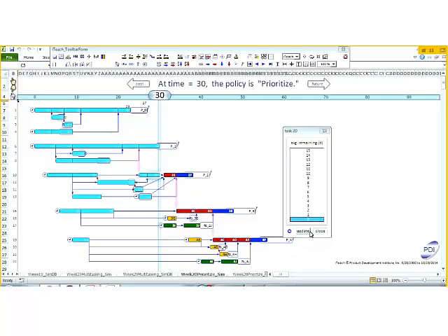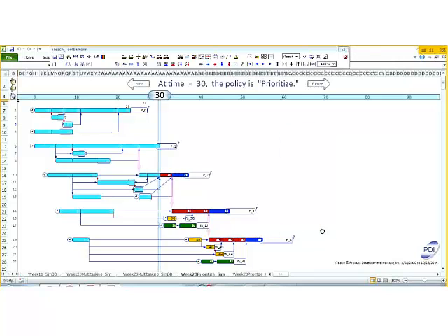Do things seem to be going better? Okay, we've done all the updates for week 30. Let's close this. See how we're doing. Take the pulse. Okay, project 0. Completed, week 23. Project 1, completed, and we've got about a week's revenue. It completed at the very beginning of the buffer, just a little bit of a buffer incursion, so it's completed much earlier than our delivery. So if the customer can take it early, we can deliver it early. Otherwise, we've got a guarantee that we're going to deliver it on time.